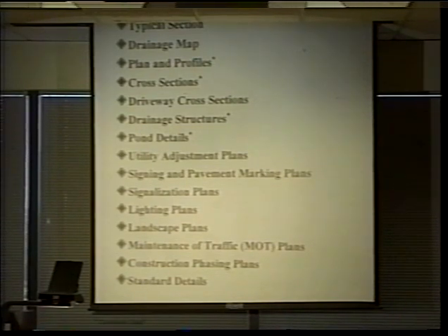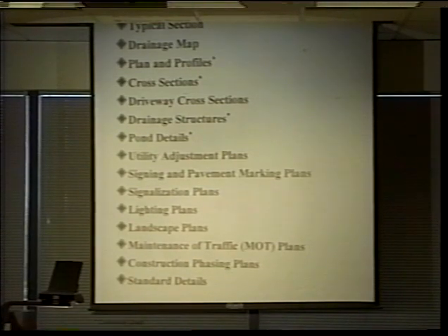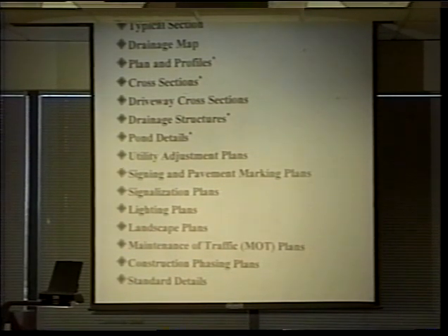If you're a commercial establishment, you'll want to have some attention paid to how long and for what duration driveways are going to be closed, or how the traffic is going to be diverted, and for how long throughout the construction process. That goes hand in hand with the construction phasing. Those two typically work together. So you'll see the MOT, maintenance of traffic, as a separate plan package.